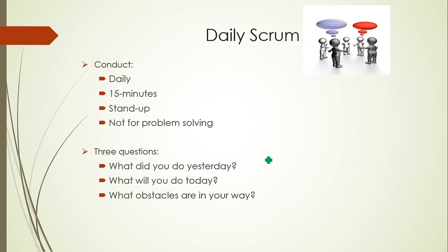In this meeting, only three questions are answered by all team members. What did you do yesterday? What will you do today? And if there are any blockers or impediments.